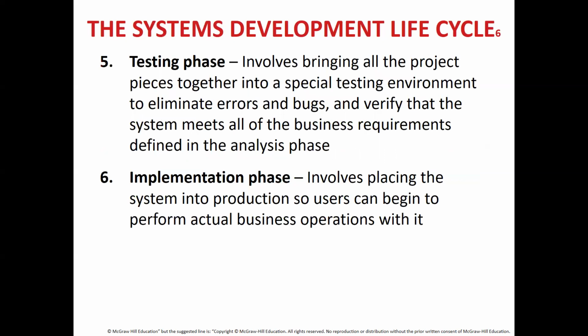Now, after the development phase comes testing phase. It involves bringing all the project pieces together into a special testing environment to eliminate errors and bugs, and verify that the system meets all of the business requirements defined in the analysis phase. So in the testing phase, all the requirements that you've listed in the analysis phase, you'll have a checklist of that, and then you'll start using the system. And once you use it, you'll place a check or a tick whether the system that is actually developed meets the requirement that was specified in the analysis phase or not.